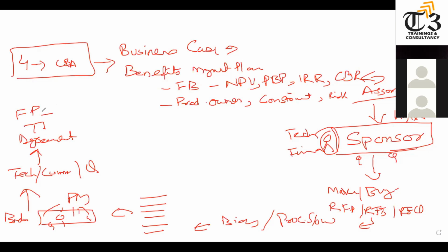Fixed price contracts can be used for longer durations of projects. Buyer is safe, seller at risk. It has three types: fixed price lump sum, fixed price plus incentive fees to promote the supplier to finish earlier, and FPEPA, which means any changes because of government regulations will be reimbursed.